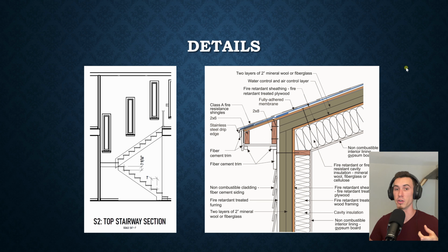If another builder is responsible for your project and you're going to have a whole bunch of crazy air detailing and insulation detailing and this, that, and the other, that's going to drive his prices way up, because the framers and the siding guys are not used to doing that work. It's going to take more time because it's going to cost more money. That stuff needs to be brought up front.